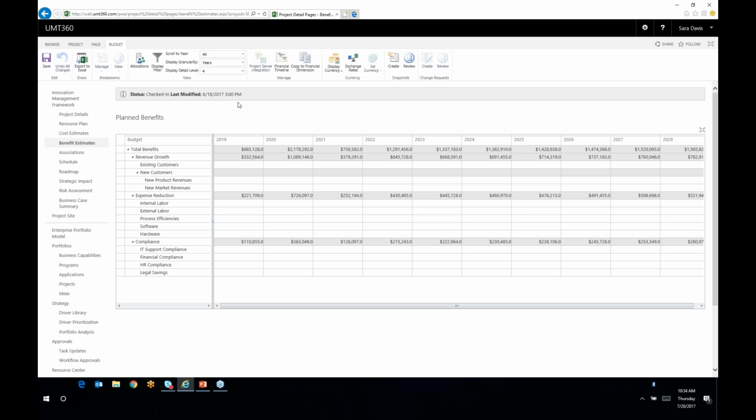Many of you, whether it's in Excel or not, are including benefit estimates, but very few of you are then reforecasting benefits through the life of the project, which is key in establishing a true benefits realization framework even before you start to track, because variables can change, costs change over the life of the project. Why wouldn't benefits forecasts change in the same way?